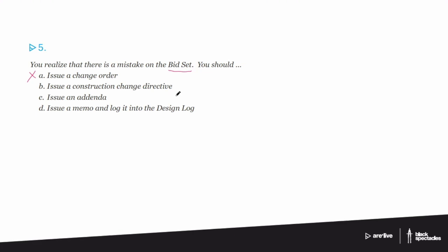So it's a way of bumping the cost issue of a change order down the road, but keeping the project going. Otherwise, if you stop and wait for an arbitration process or litigation, you might have everybody standing around for a year or two before that gets worked out, and that just doesn't make any sense.